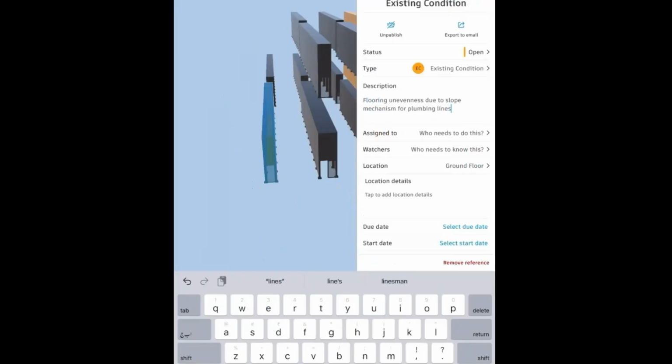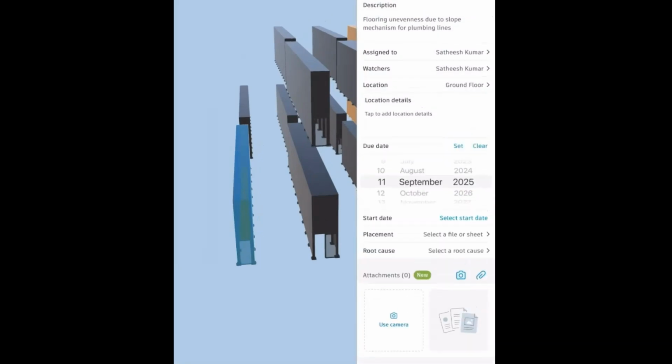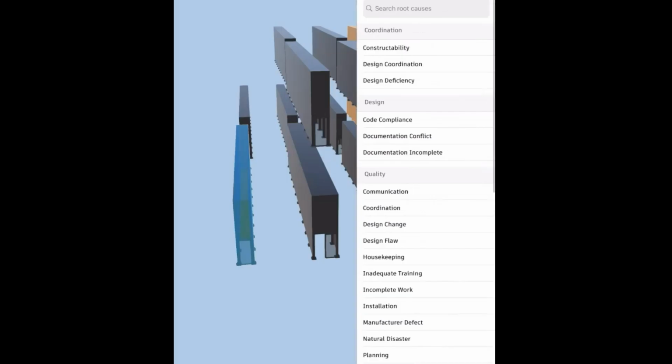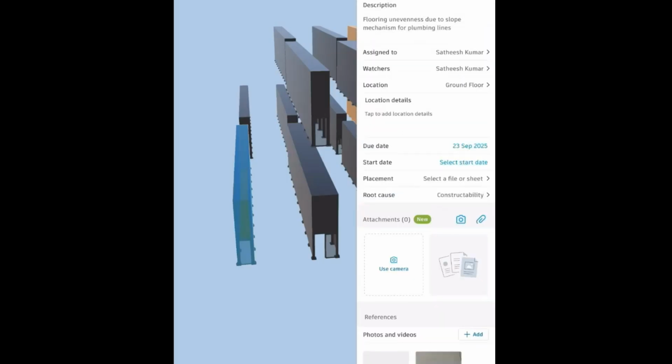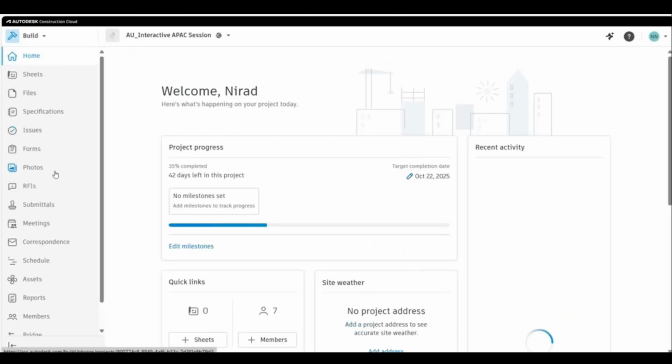When a final location question comes up, we raise an issue directly from the model and assign it to the engineering owner. We can describe the issue, set dates, and update the metadata, keeping the discussion anchored to the exact asset and the context.